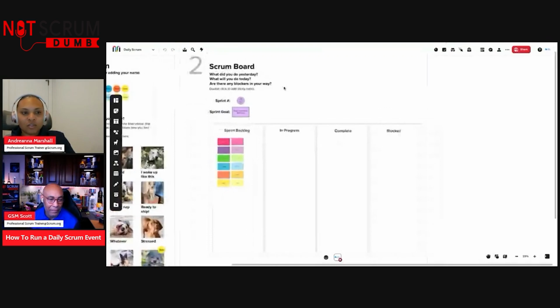Now, the first thing that I do want to point out is these questions, which are not mandatory. So that is one technique that you can use, answering the 3 questions, which was in the 2017 Scrum Guide, no longer in the 2020 Scrum Guide. It's always been optional. This is just to help guide you through, but you don't have to use this.